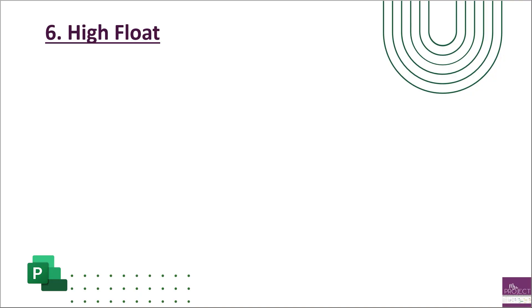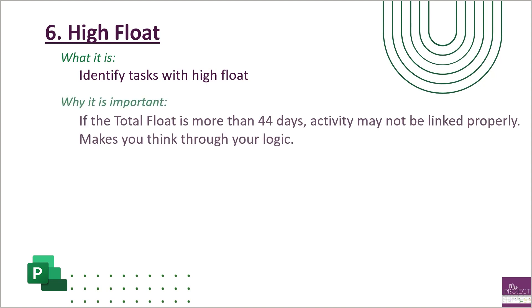A recap on this metric of high float: you're identifying tasks that have high float. DCMA has the metric saying that nothing can have float that is greater than 44 days. Why is this important? Because if you have tasks that have float greater than two months, it just means that it may not be linked properly to another task. So this metric just makes you think through your logic. Yes, you could be passing metric one of the logic saying every task has a predecessor and successor, but this metric makes you look at: did you link it properly? Is it linked to the right one?